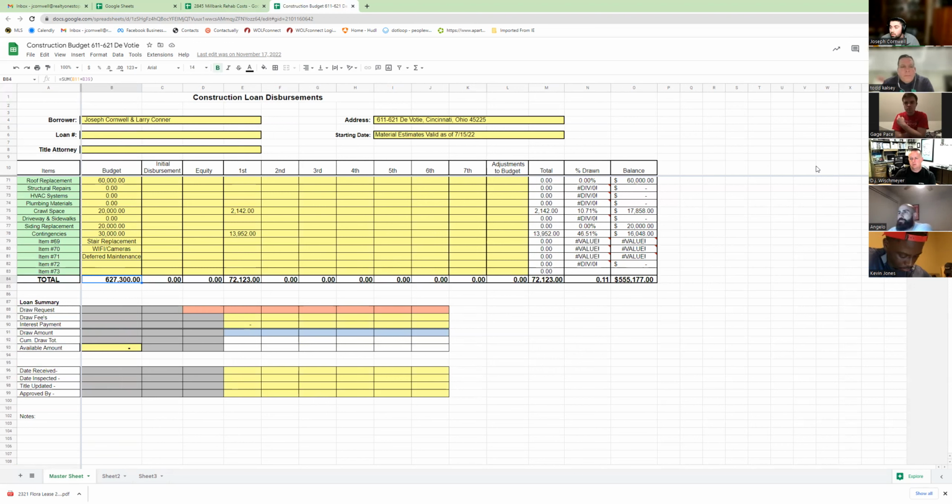If I were GCing this project, my typical margin is anywhere from 20 to 40%, depending on what I'm doing, so that's going to vary some. And when I'm doing sub work, that usually has a lower margin because I'm not really babysitting, right? I'm bringing in my guy that works for us. I'm saying, here's our scope. They're giving me a material price. They're giving me a labor price. I'm going to the customer with one number. I said, hey, this is my cost and this is your cost, right? So it's a lot simpler.